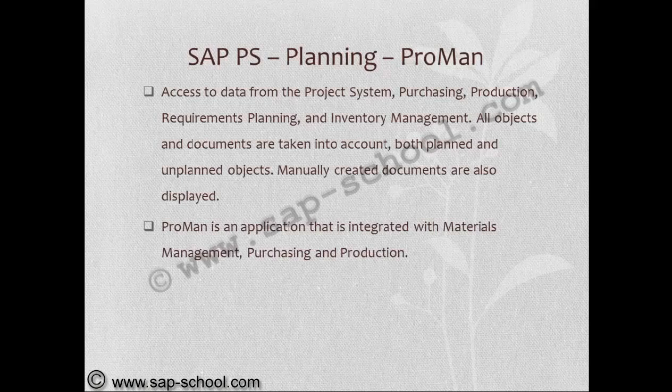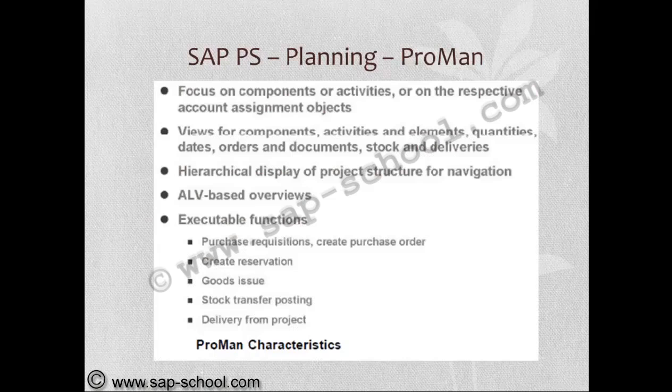ProMan is an application that is integrated with materials management, purchasing, and production. It focuses on components or activities, which are the respective account assignment objects. Views for components, activities and elements, quantities, dates, orders and documents, stock and deliveries. Hierarchical display of the project structure for navigation, ALV-based overviews, and executable functions like create purchase requisitions, create purchase orders, create reservation, goods issue, stock transfer posting, delivery from project. These are the characteristics of ProMan.